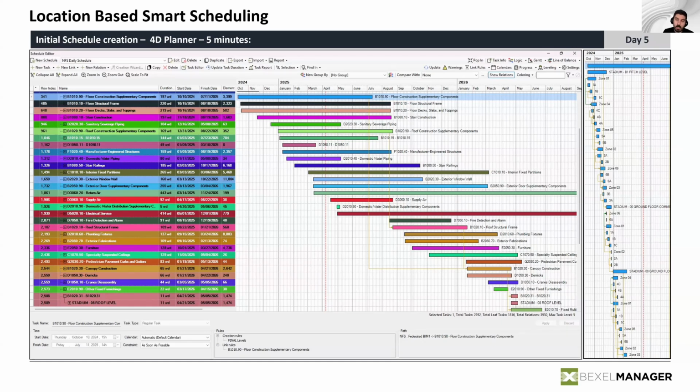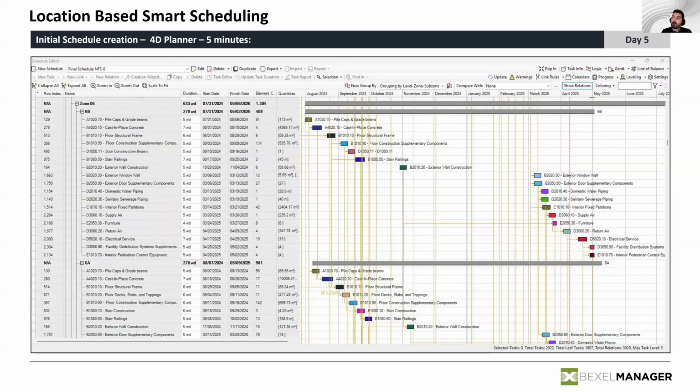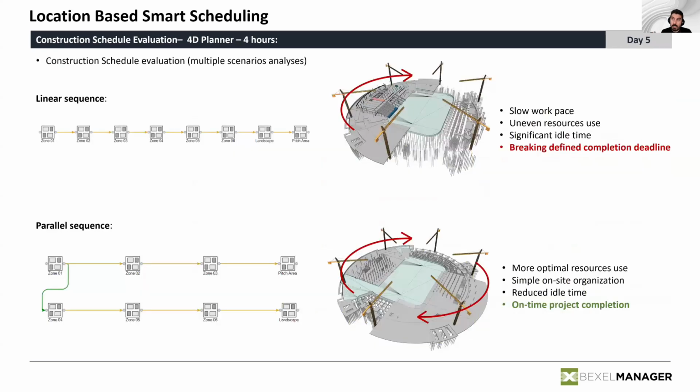slab, or in more realistic terms, we would probably subdivide it into 3 tacts or 3 subsections, along 1 day each, so that we can execute it in a proper way. So we simply went through fine tuning the relations between specific types of works. Then the next thing is, okay, we optimize resources, I mean the quantities of execution, but